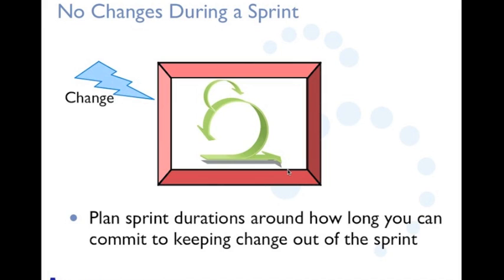If it is a very dynamic environment, I have seen teams adopting a 1 week sprint, also where they want to get feedback from the stakeholders sooner. But in a lot of product development companies where things are more stable, people go for 2 to 3 weeks, and even in some complex products I've seen it go up to 4 weeks. So the idea is how to not bring new changes within that sprint.